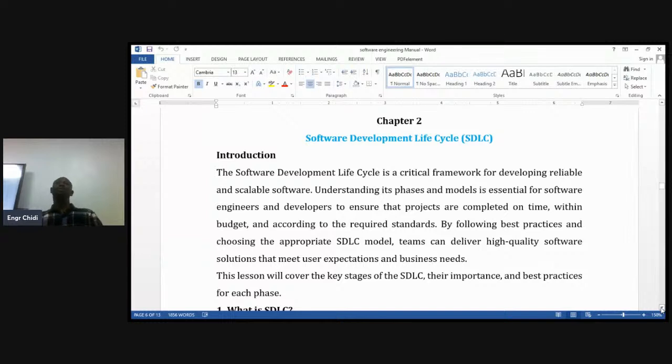That's why before you give code for software, you must have had at least the second phase of the software development lifecycle, which is you must have gathered the requirements, you must have done the basic analysis to know what it will take. So people don't just call you and say, Engineer Musa, so you're a software engineer now. You say, yes, okay. How much will you take to do a software for me to manage my small business? You now say 50,000 or you say 500,000. Another engineer around will know that you're not an engineer yet.